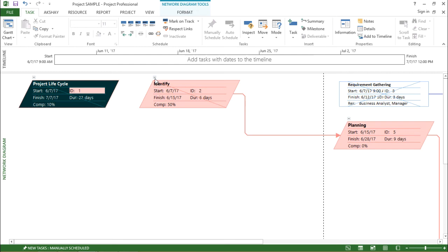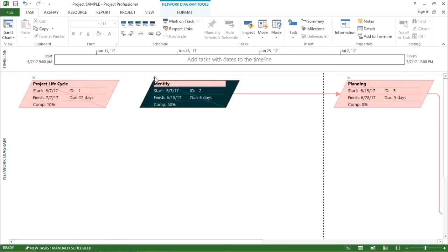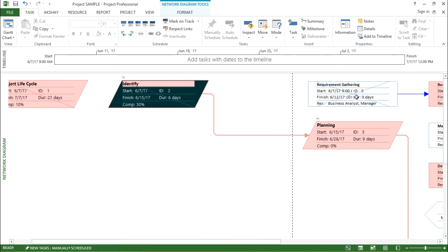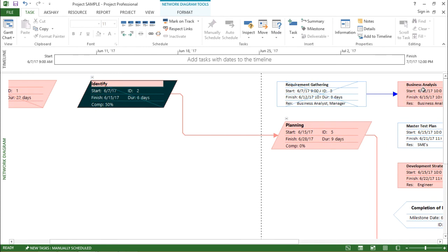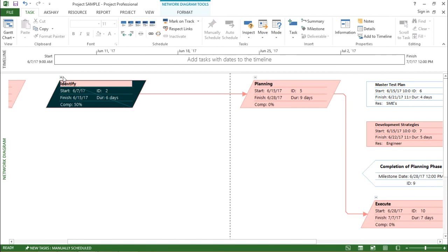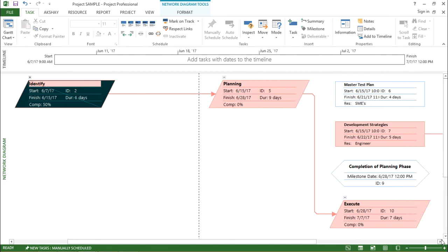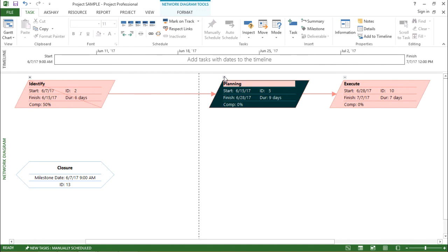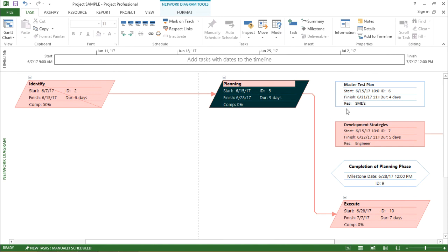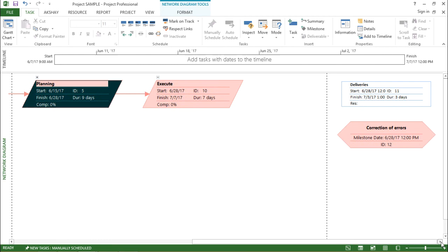For 'identify', I have a minus button. If I click on it, the subtasks collapse, and clicking the plus sign expands them again. For 'identify', the two subtasks are requirement gathering and business analysis. For 'planning', the subtasks are master test plan, development strategies, and completion of planning phase. Clicking the minus button minimizes all the subtasks, and clicking plus expands them again. This is all about the network diagram view, which helps me understand my project according to the network diagram.